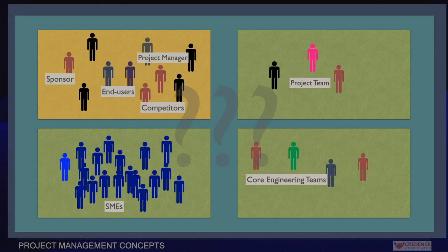The activity of identifying the stakeholders should be done right from the initiation of the project. Most of the high-level stakeholder information like client, end users, sponsor, and project manager might be available from the project charter or business case. Identifying the project team and the resources is an obvious and simple next step. Stakeholders who are not directly connected with the project are difficult to identify.